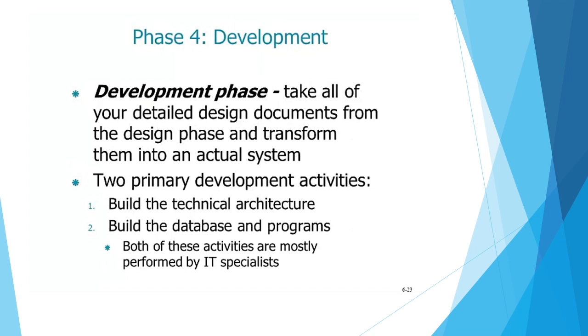The development phase is where you actually take the design document, the pseudocode or whatever it is you have, your blueprints, and you create the system. This is where the technology is actually coded, goes from documents to an actual digital artifact. This is the part of the SDLC where, if there's going to be any outsourcing, it usually starts, because at this phase you have documents and anybody who can code in a particular language, Java or whatever the project's going to be developed in, doesn't necessarily have to be so connected with the organization.